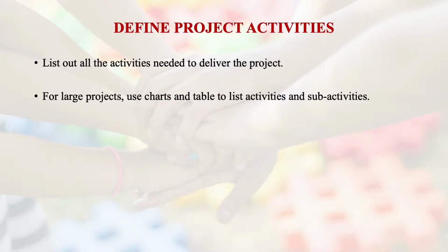Now this is another interesting one. These terminologies are fine, but unless we do an example, you won't be able to appreciate what exactly is going on, and you have to be very particular about these equations, because they look very difficult, but logically they are very simple. Okay, and that's what we want to see. So this process of computation of the Li value for each event will continue till the starting event, where Li equals 0 and Ei equals Li equals 0, is obtained. So this is how we are going to compute the project time.